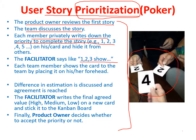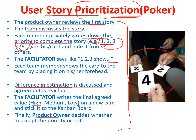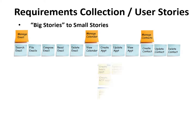The facilitator says one, two, three and everyone reveals their card. Differences in estimation are discussed and an agreement is reached. The story is labeled high, medium, or low priority and placed on the Kanban board. For example, one means the lowest priority and five means the highest priority. Finally, the result is shown to the product owner. That's all — thank you very much, and please ask if you have any questions.